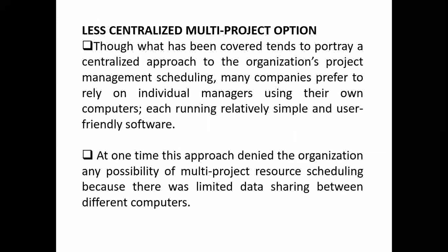If you're working with a bigger network, perhaps having so many projects in it, you might be able to decentralize the project, meaning you might be able to assign people or some subgroups with their sub-project managers to manage those sub-activities in various places. And then eventually, there must be a reporting system where all these sub-managers should be able to report back the results of what is happening in those individual branches.